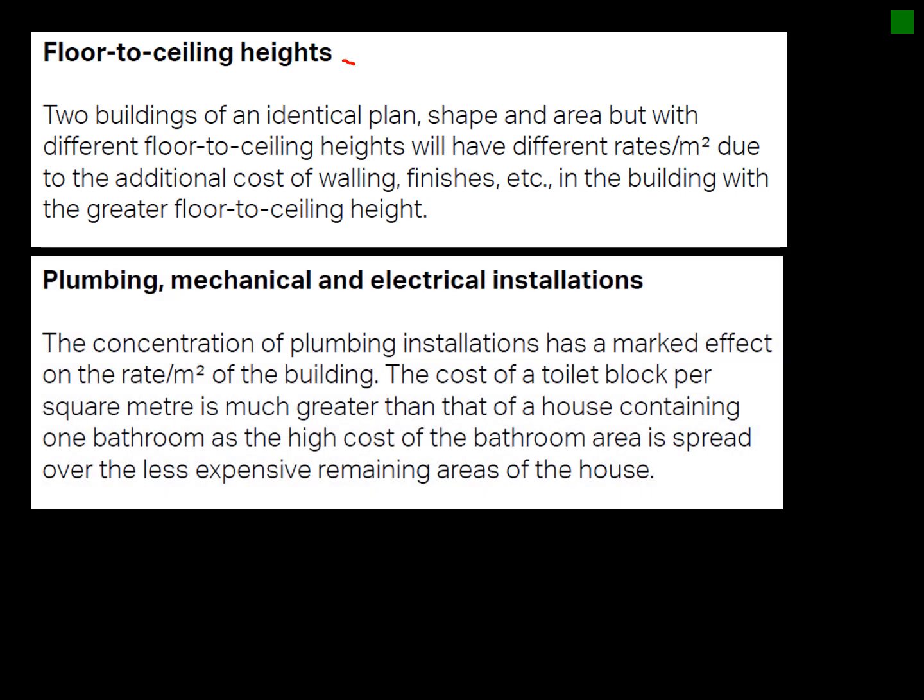Your plumbing and mechanical and electrical installations will have a big influence on your rate per square meter. A toilet block installation will have a lot more technical plumbing, which takes the rate per square meter up. When doing your task, consider the historical building you're basing your rate on — how many bathrooms did it have versus your new one? For example, two three-bedroom houses where one has en-suites will obviously have a higher cost.